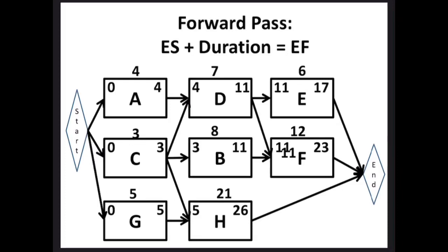Let's go. Question. Yes. The A and the G, don't they come before B? Because they're the same line. The only activities that follow the arrows, right? The only activity that B needs in order for it to start is activity C. Parts of A will be done and parts of G will be done, but B does not need A and G to be done. B needs the C in order to begin.